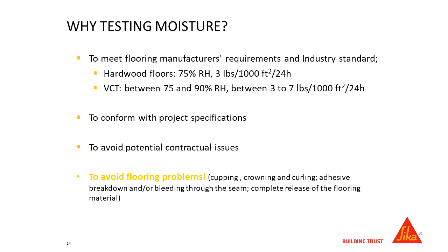A lot of times also it's written into the project specifications where the architect or the designer is saying, listen, before you proceed with your finished flooring install, I want you to test the slab and I want you to submit the results. That is a way for the architect to ensure that the product he specified is being installed correctly because he's writing a moisture test into the specifications. Also, obviously, to avoid potential contractual issues. Sometimes flooring contractors will write into their flooring contract that they will not install over top of a slab that is emitting too much moisture, and therefore they will test the slab for moisture and they build that into their pricing sometimes. But obviously the number one reason we test for moisture is to avoid flooring problems.